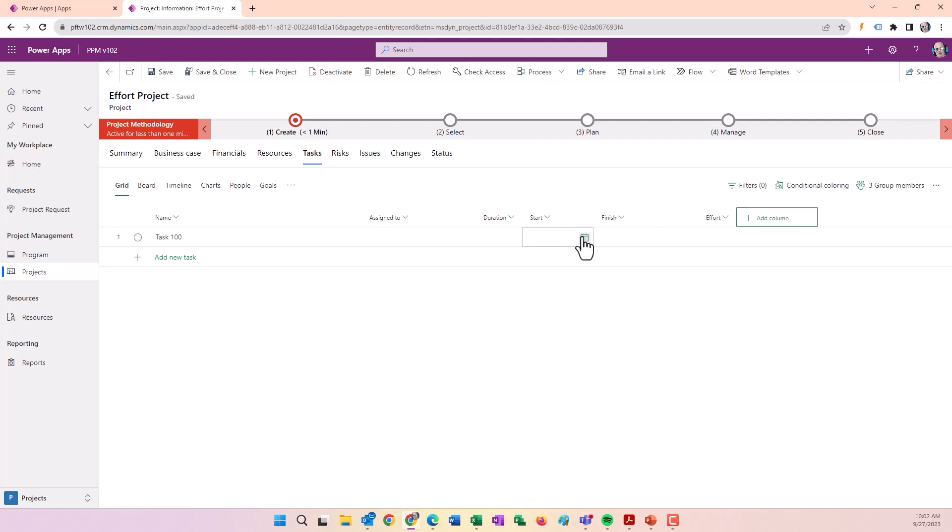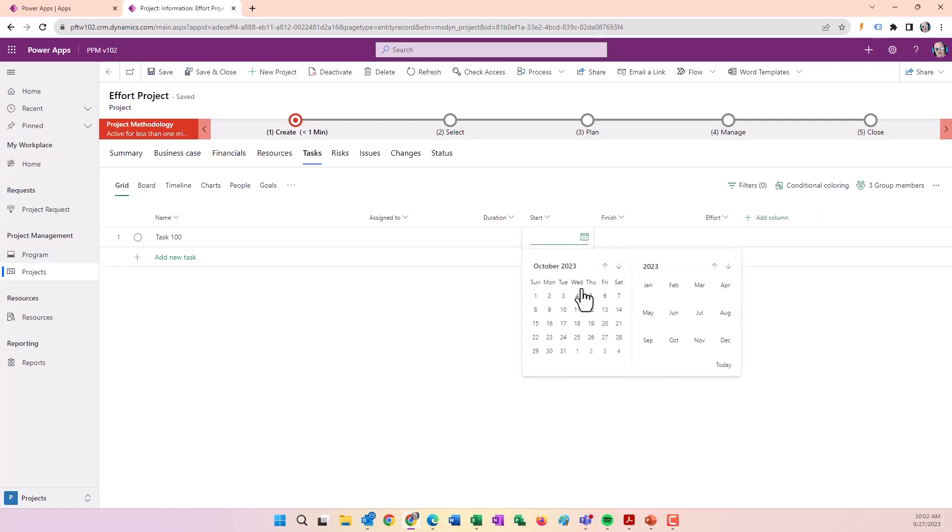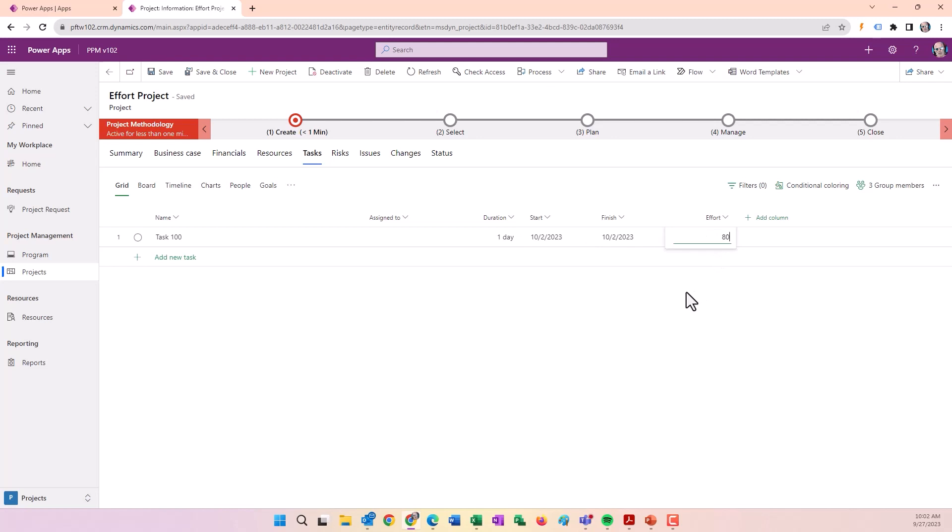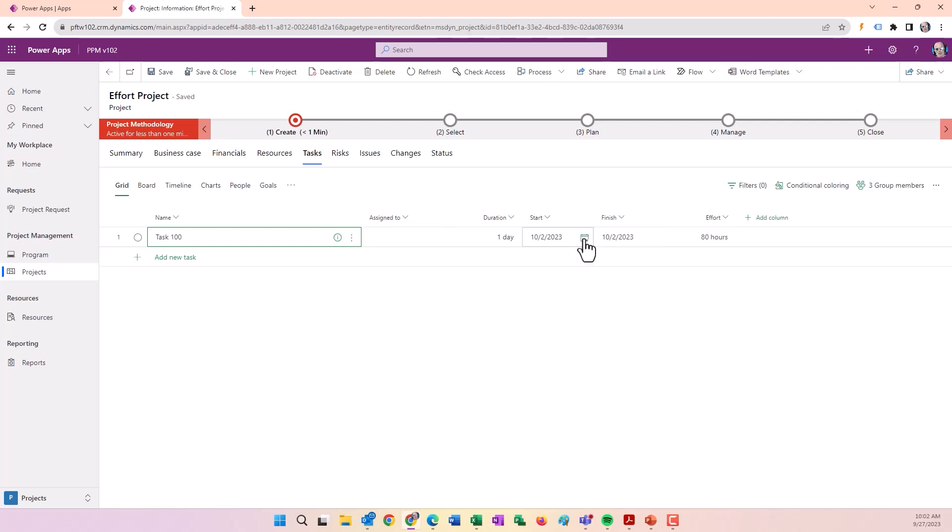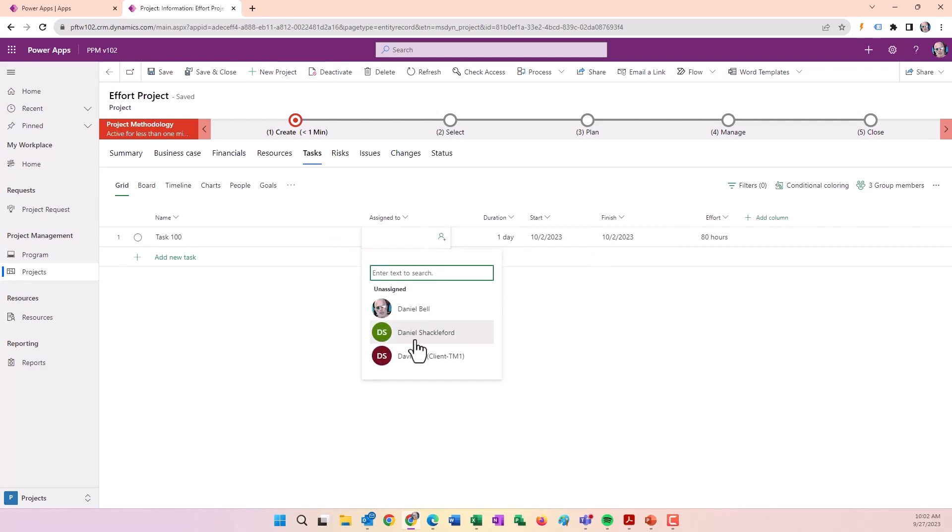We're in an Effort project, so the effort is fixed. Typically I want to enter the effort estimate first, so I'll put in 80 hours with a start date of October 2nd. Since the effort is fixed, when I assign a resource, the duration is going to change because the work can't be done in one day.